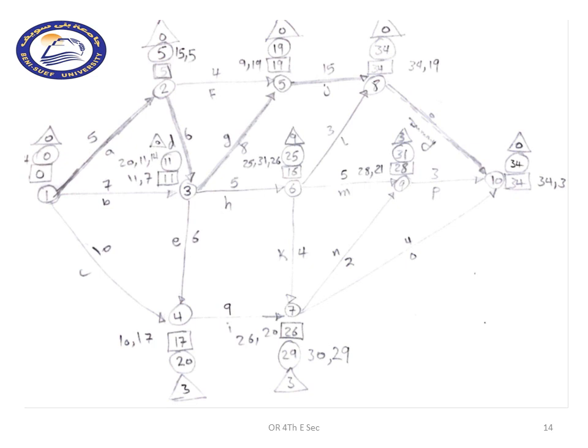Here, as you can see, the same path that we selected in the previous section, which is A, B, G, J, and dummy. These activities will have 0 slack times from the beginning and the end of each one of them. So activity A will have 0 slack time before and 0 slack time after it.